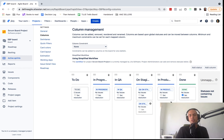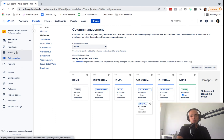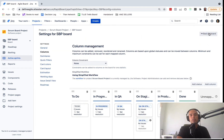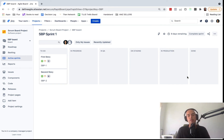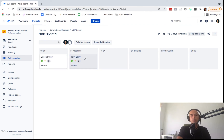Don't make the workflow too complicated, because the more complicated it is, the less willing people are to follow the process. There are also workflows — which I won't cover here but I have videos on — where you can limit where tickets can go. For example, you could prevent moving a ticket from In Progress directly to Staging without going through QA first, or prevent anything going to Production without passing through Staging.